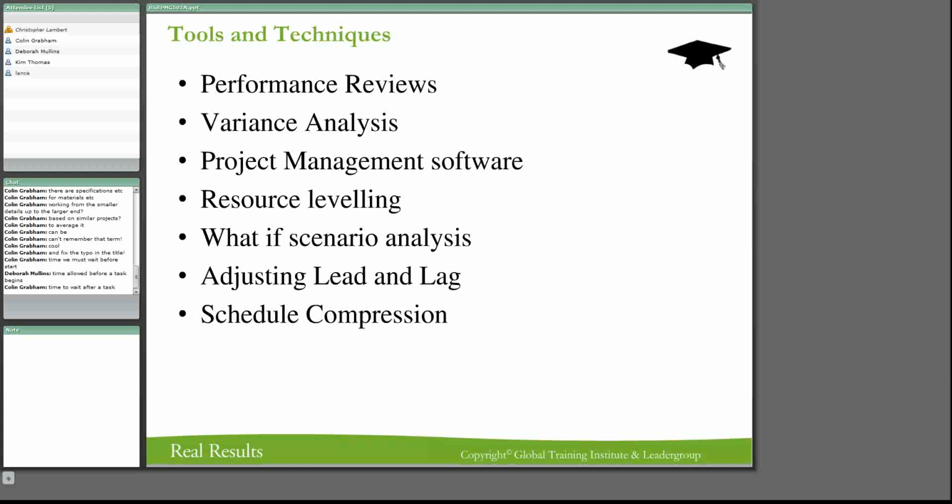Some project managers like to put in a buffer for everything that they do. So what they do is that they say, we're going to estimate that this project is going to take so long, and they actually add 50% to it. That is a very bad technique. Because Parkinson's law says that a job will take the time that you've actually allocated for it. Right? And it's better to say I am going to buffer in and have a reserve buffer of a duration.